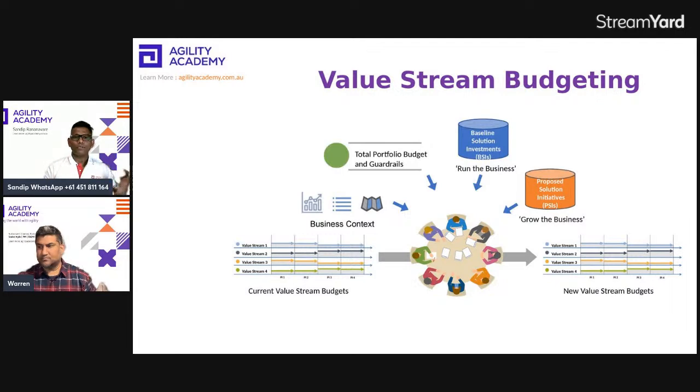So when you talk about value stream budgeting, there's a new concept introduced in this Lean Portfolio Management program, called participatory budgeting, wherein rather than someone deciding from the top who needs to do what, you involve people who are working on the ground, and then give them funding and say, okay, here are the $100. Now you decide, if there are 10 things on our plate, 10 initiatives, 10 epics, how much funding needs to be assigned where. And that's how you make it collective ownership.